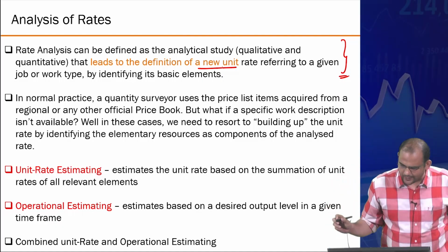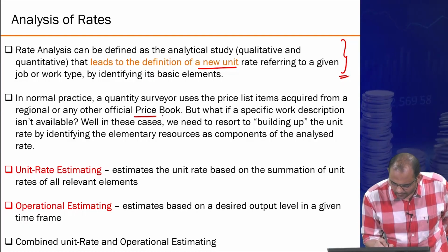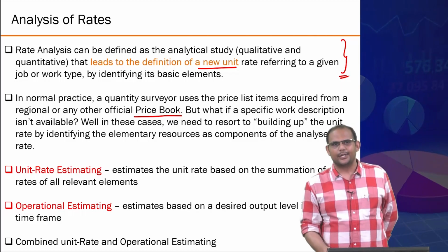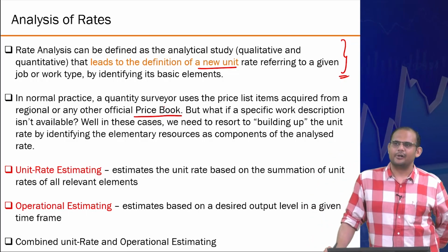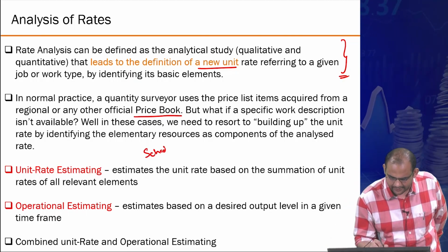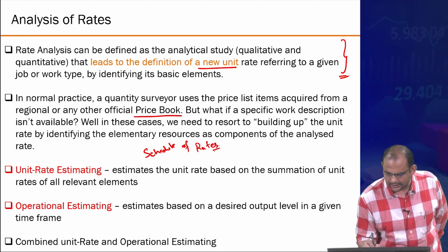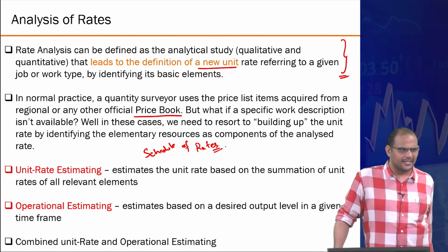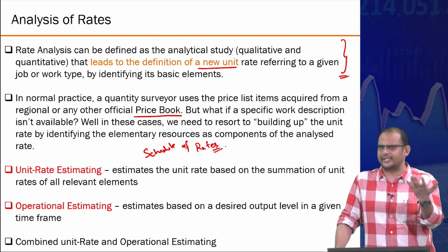Now there are two ways of defining unit. Typically there is also the price, or how do you estimate the cost of an individual unit. You actually rely on something called a price book. This is also the schedule of rates, as you will often find. Typically these are government issued norms, that for skilled labor, this is the kind of average acceptable price, and this is available state by state, periodically updated every 5 years, 10 years in India.